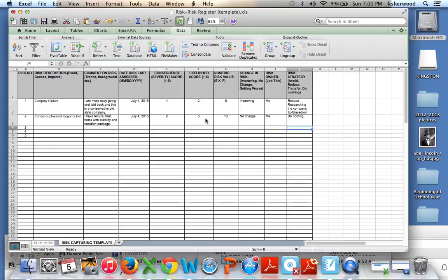For our project plan, it's a little more complex. You have to put yourself into the case study and think about what those risks are for the project, and then afterwards the change. So what are the risks for the project? They're going to be things like poor requirements in your description, and the comment on it would be, what's it lead to? It leads to bad design because the person who's doing the coding didn't understand the requirements very well.